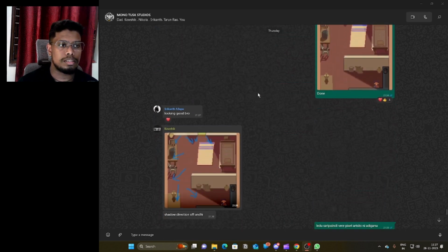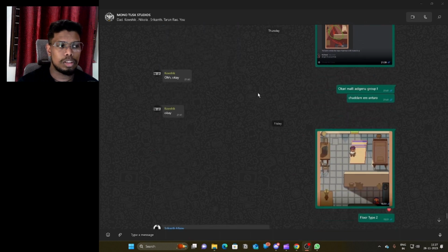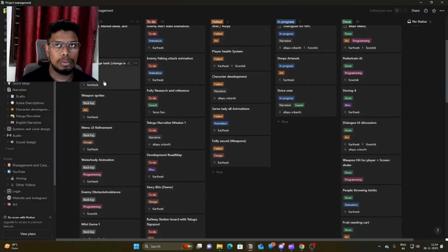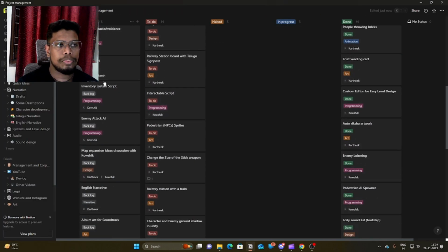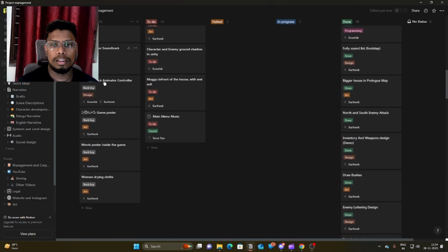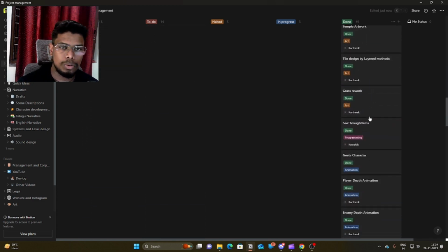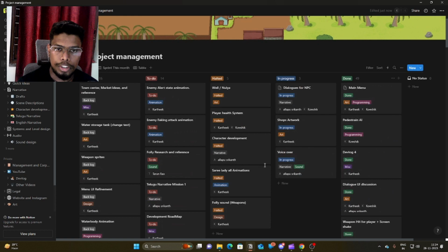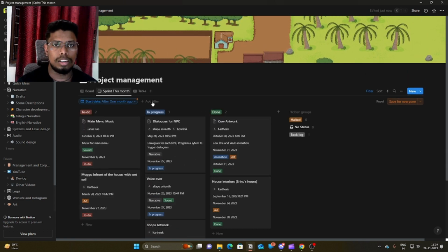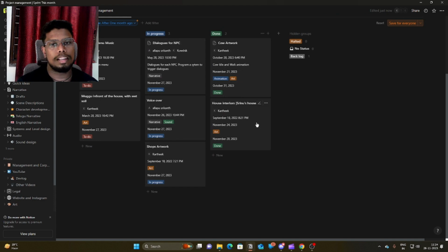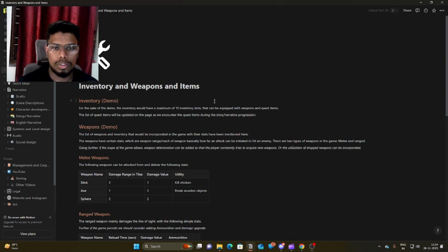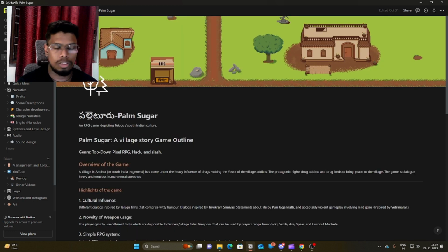But at least for the current status of the project, we look at the project management Kanban board once a week, usually on Sundays. Since the Kanban board gets populated with a lot of work that we're supposed to do, I've created a filter for the tasks that we need to do in the next 2 months, and then we work on that. As we complete work, the filter gets modified to the nearest month, or the nearest 2 months, depending on how that works.